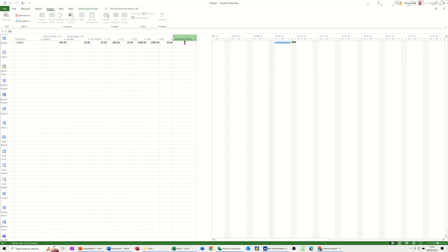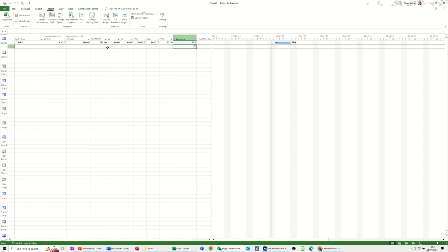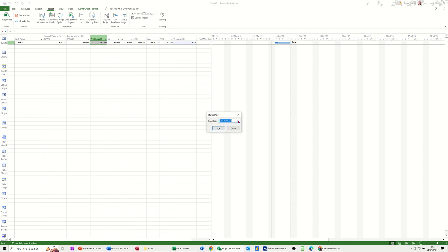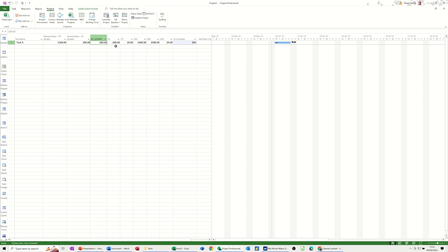Now if I add a % complete column — this is 2% complete. So if this is a five-day task and I set that to 20%, that's now exactly as it should be. According to the status date of today, I'm OK. If I change that status date to Tuesday the 6th, I've got a scheduled variance of minus 80 again.